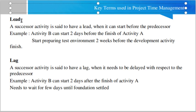The first term is Lead. A successor activity is said to have a lead when it can start before the predecessor activity finishes. For example, activity B can start two days before the finish of activity A. A practical example: start preparing the test environment two weeks before the development activity finishes.